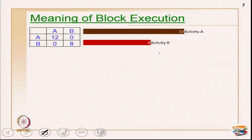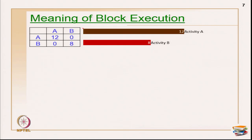I have taken a very hypothetical example with a block having activities A and B. The duration for A is 12 and duration of B is 8, and I have used 0 as the relationship between the two activities. Zero implies there is no relationship between A and B. Suppose if you want to have a minimal value, you may put 0.1 to show repetition; otherwise 0 implies no relationship at all.